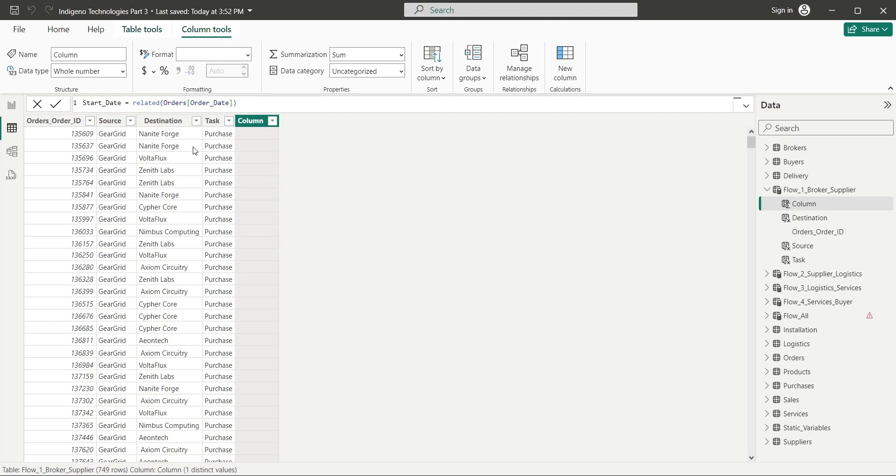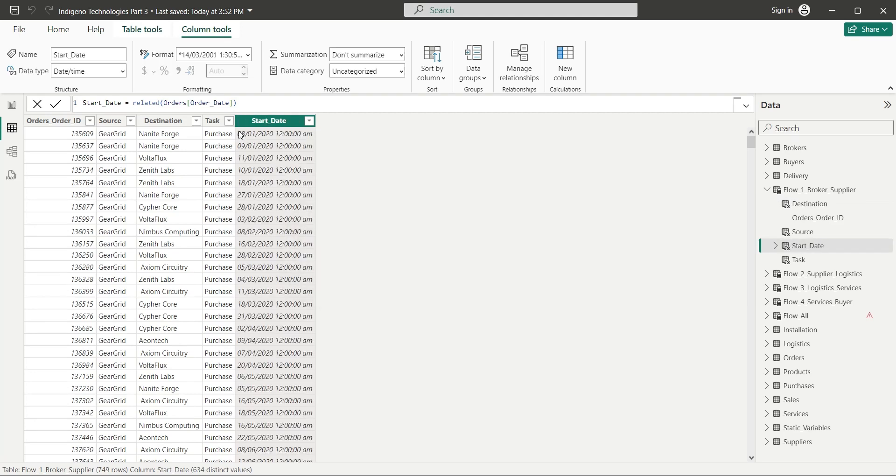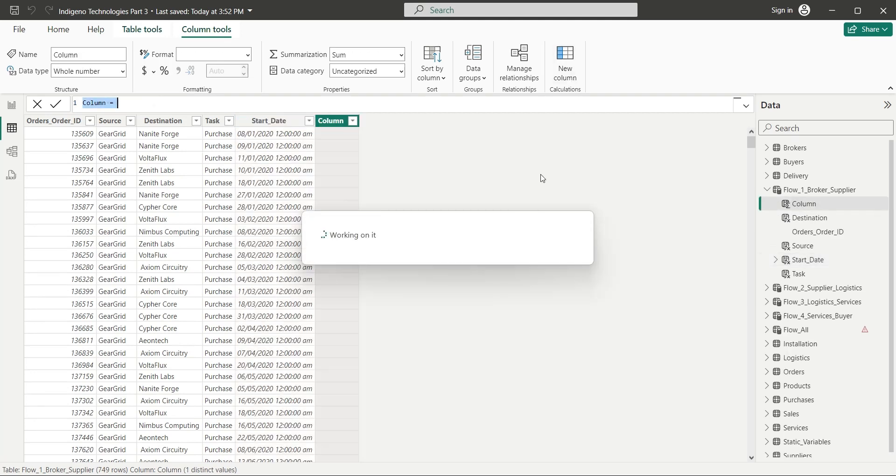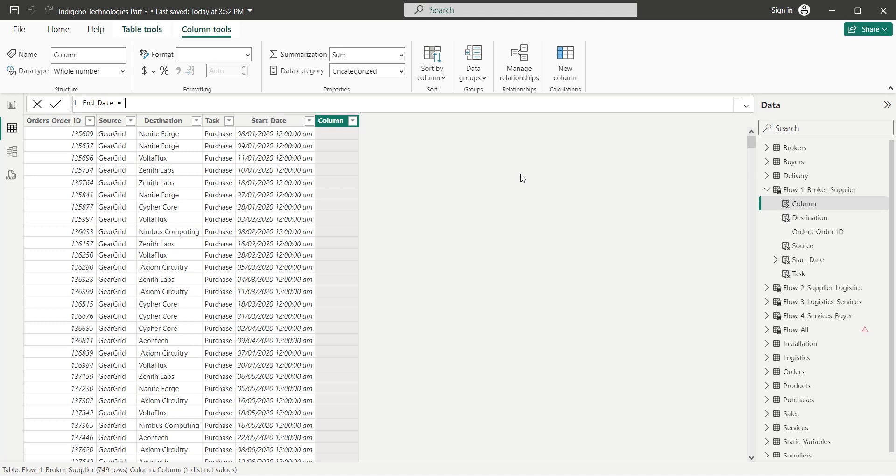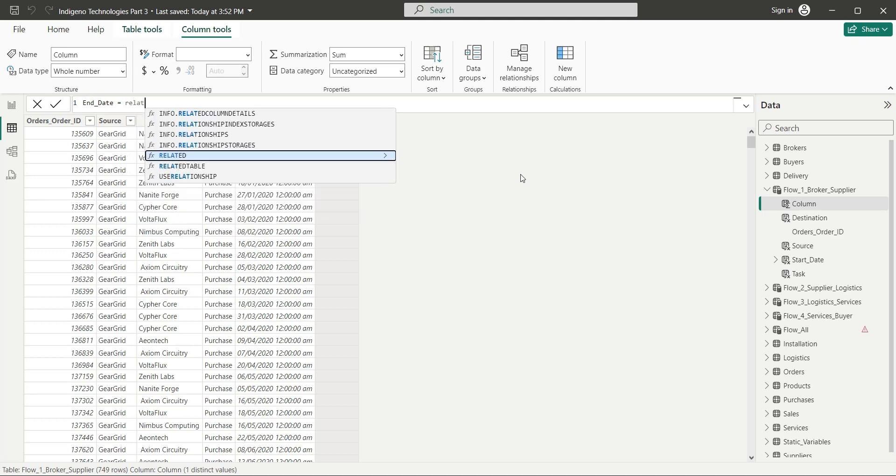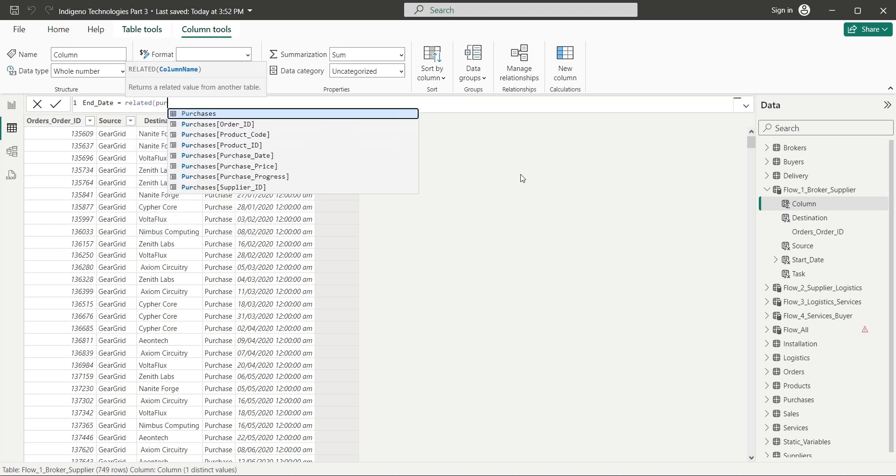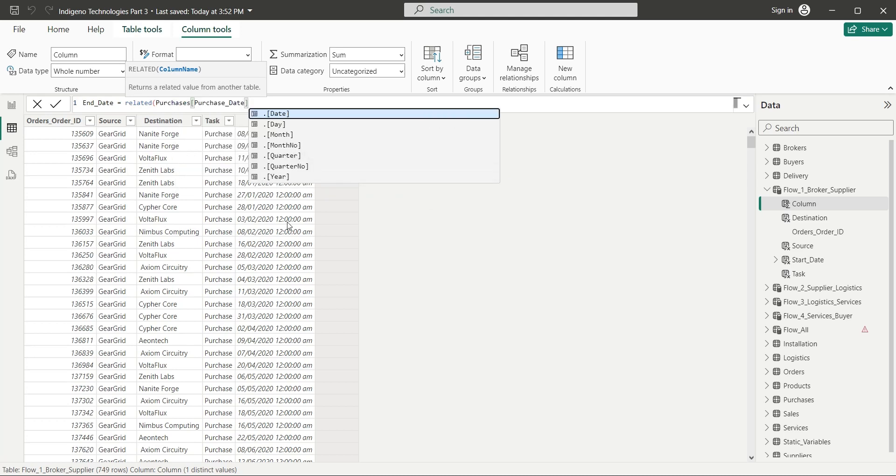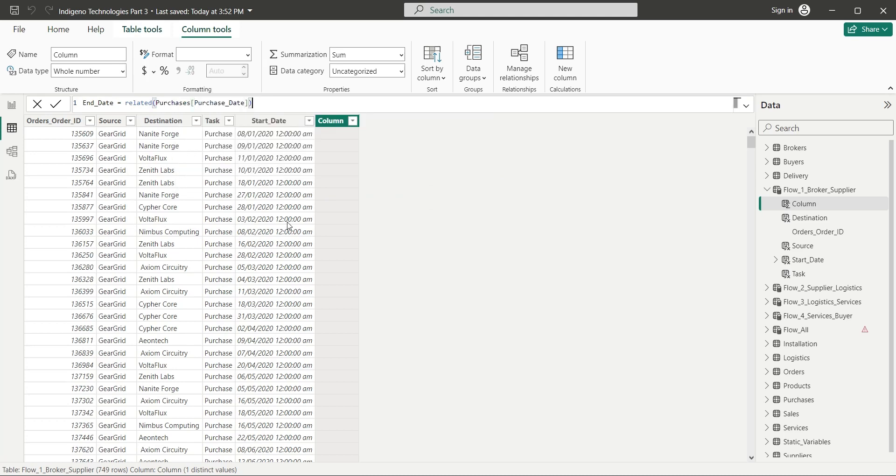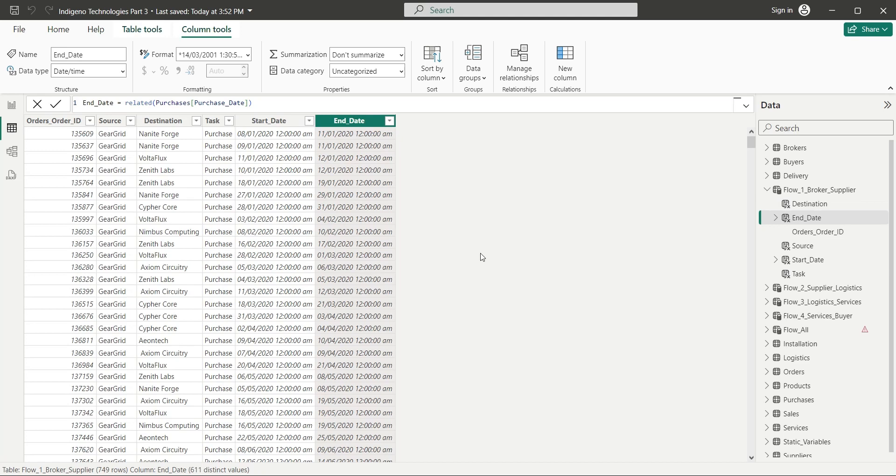Because the tables are connected through a relationship. The task ends when the product ordered is purchased. So the purchase date of the product will be the end date of this purchase task. We will get the purchase date from the purchases table using the related function. And now we have all columns that we need in our first table.